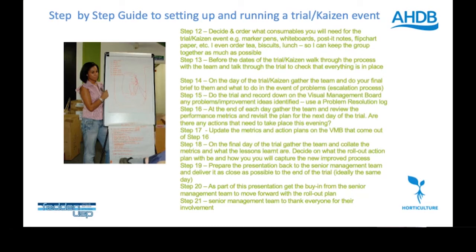Step 18, on the final day, we used to just basically record down what the lessons learned were from the trial. So we just summarised them. We'd say what had worked, what hadn't worked, what we were going to adopt as the normal way of working. So what we were going to roll out to become the normal way that we operated in the future, and what things we thought actually needed a bit more improvement work doing on them before they were ready to be rolled out. So we just capture all that, and the way we used to capture it is a one-page learning points. I'll show you again further down the slide pack.